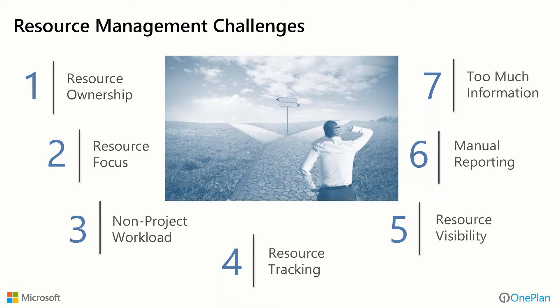What should I do first? What are the organization's priorities out of all the things I get? Then there's factoring in non-project workload. If we think we're going to assign 100% of people's bandwidth to projects, it obscures the reality of administrative work, meetings, and other things that effectively make our net bandwidth less than we anticipate. And then how are we going to track resources? How do we get feedback on what resources have actually accomplished, how much effort they've spent, and how do we get visibility across all the different things coming from emails, spreadsheets, or various work management tools?